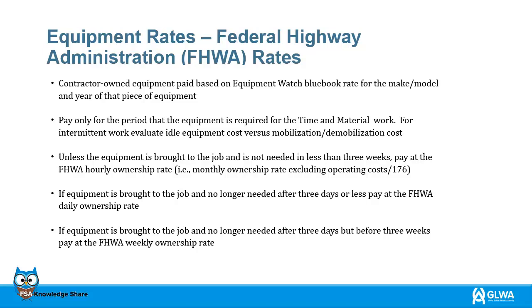If equipment is brought to the job and is not used after 3 days or less, pay at the FHWA daily ownership rate. If equipment is brought to the job and is not needed after 3 days, but before 3 weeks, pay at the FHWA weekly ownership rate.